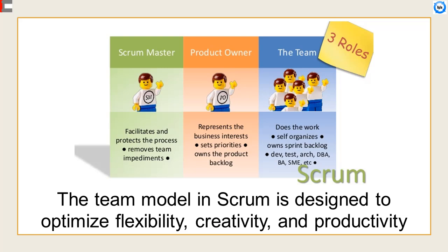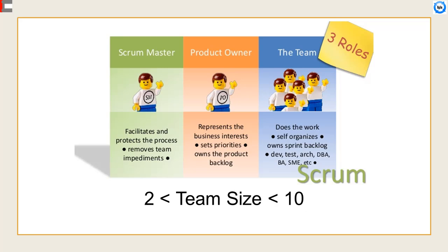Optimal development team size is small enough to remain nimble and large enough to complete significant work within a sprint. Fewer than 3 development team members decrease interaction and results in smaller productivity gains. Smaller development teams may encounter skill constraints during the sprint, causing the development team to be unable to deliver a potentially releasable increment. Having more than 9 members requires too much coordination. Large development teams generate too much complexity for an empirical process to manage. The product owner and Scrum Master roles are not included in this count unless they are also executing the work